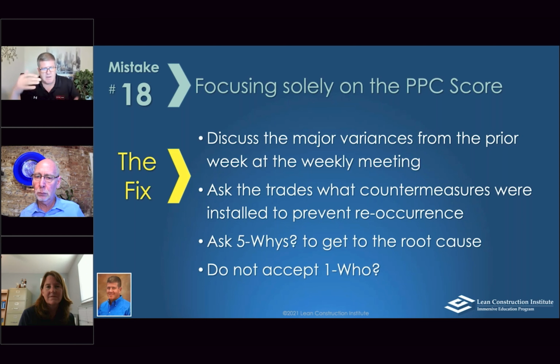You can't, everybody's speaking a different language, and you have to throw them all out and kind of start over. However, the flip side of that is if you are ready, you've talked about the areas, everybody's calling it the same thing, everybody knows the activities, the relationships. The other thing too is calling activities the same thing. Even somebody might put down sheetrock and somebody else writes drywall, right? That's a simple one, but sometimes you can have trouble tying these two together with what they're asking for. So that's the only danger with the in advance, is not having that preparation.